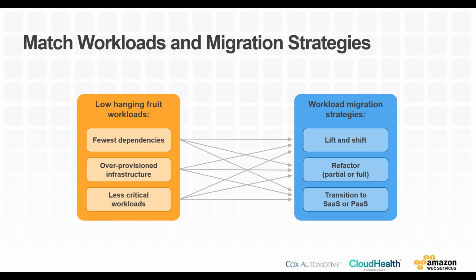So when you look at the different approaches to migration, there are really different types of approaches to what you migrate and how you migrate it across our customer base. If you look on the left side, a typical early migration that a customer will do will often start with picking workloads or applications that have very few dependencies and are usually lower risk, so that your organization can get some operating experience and migration experience and post-migration management experience with applications that have lower risk.